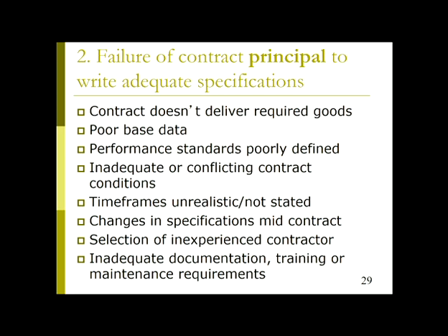These things need to have their lubrication changed at regular intervals. And so it was a classic example of these things nearly failing simply because the maintenance requirements and the training wasn't in place for the unique operation of these unique pumps. So that sort of thing happens on a scale that you wouldn't expect. You would think that something like pumping our sewage from Melbourne to Western Treatment Plant would be very well controlled and thought out.